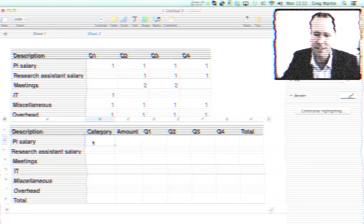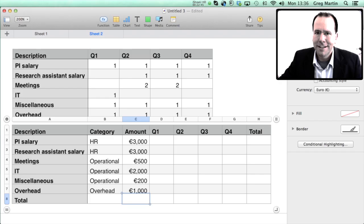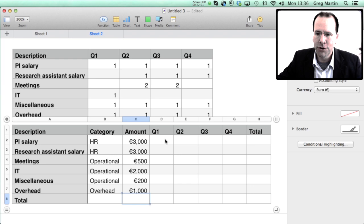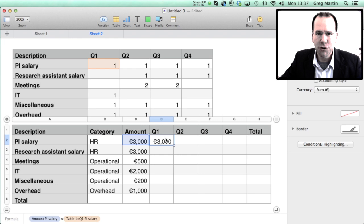So our starting point is to think through what the unit cost for any one of these items would be. Now comes a little bit of the wizardry of Excel and numbers. So what we want to do is go to our first box and we want to say that box is equal to the unit amount times by how many times that unit will be spent in quarter one. Now if you're going to work with much larger budgets you don't want to be sticking that formula in in every single cell. What you want to be able to do is drag the formula into a range of cells and have them fill themselves in for you. I'm just going to quickly show you how to do that.